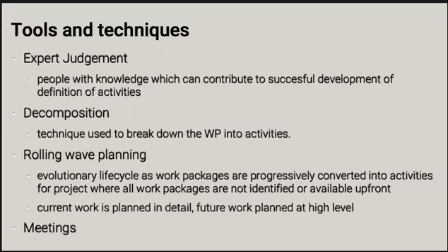The key technique for this is decomposition, and essentially that's a fancy name given to breaking down work packages into activities. That technique was also used in the process of creating the work breakdown structure, where we broke deliverables into sub-deliverables. But now we're going to break deliverables and sub-deliverables into activities. So from nouns, we're going to move into verbs. And that's going to help us identify and document every activity that we can think of at a given time.